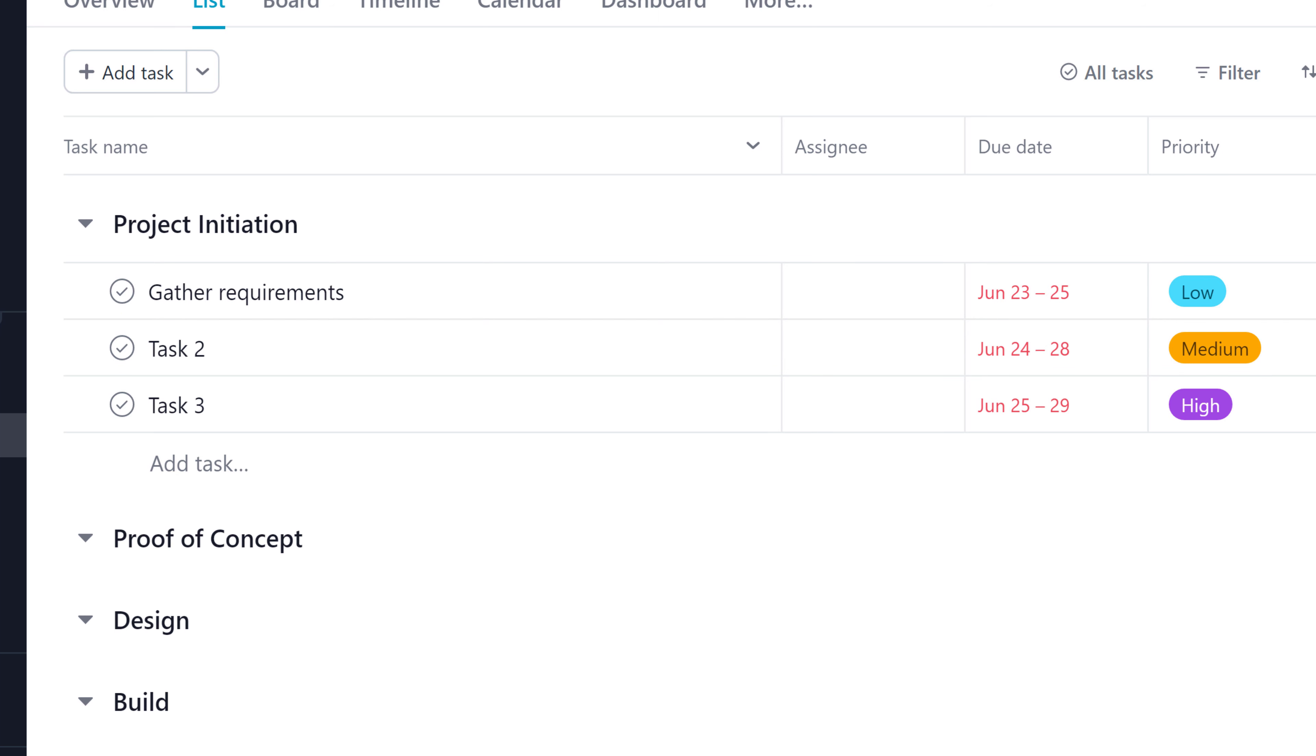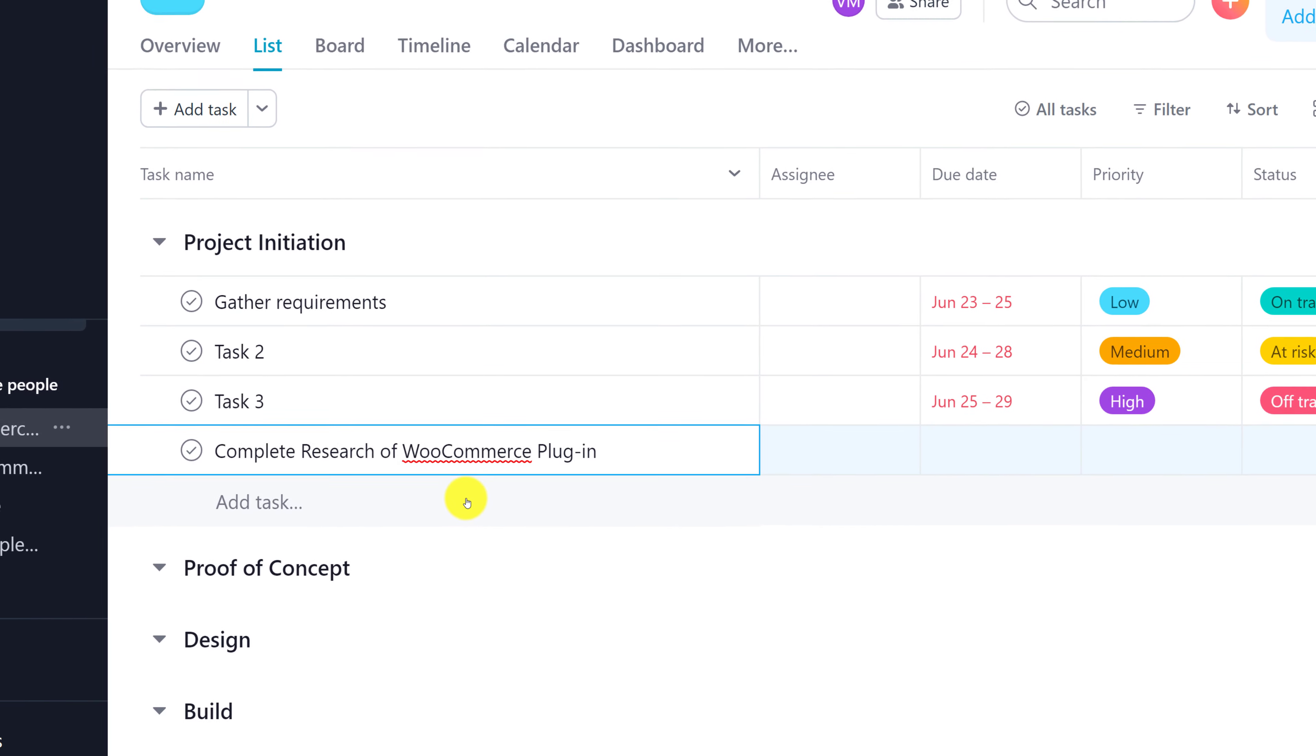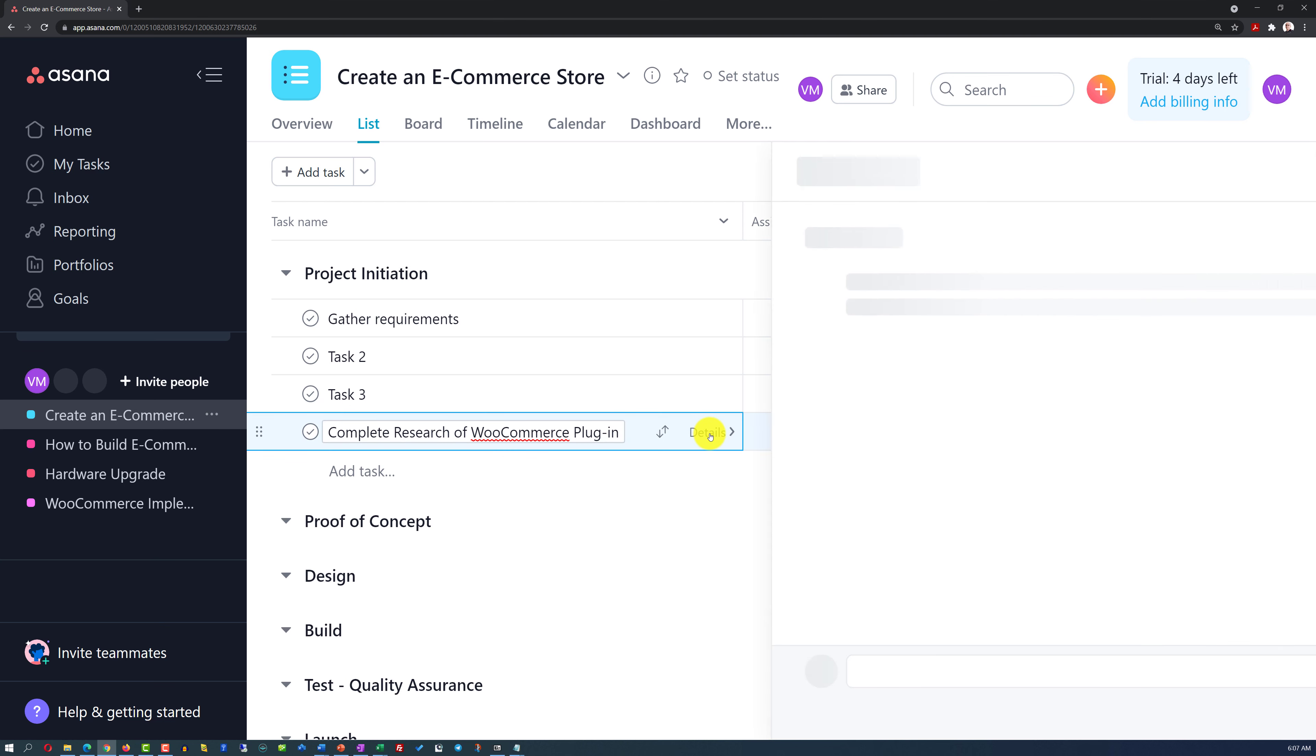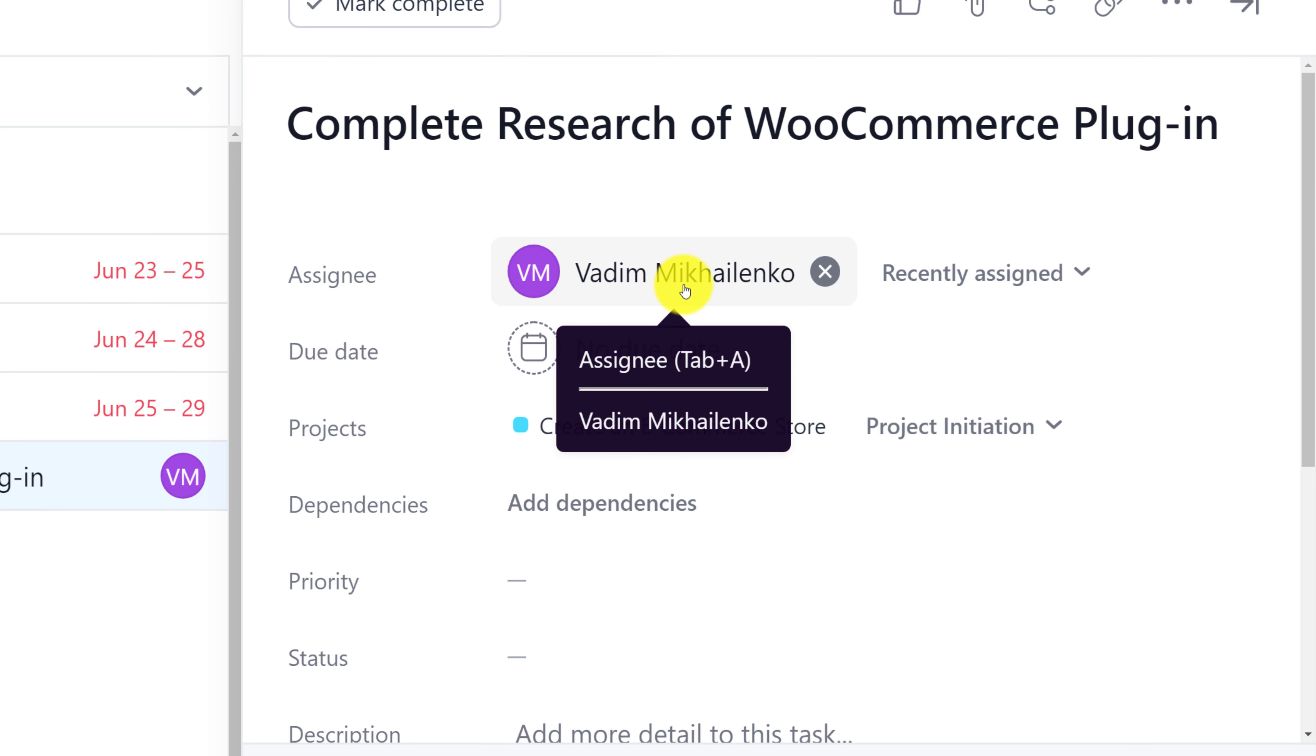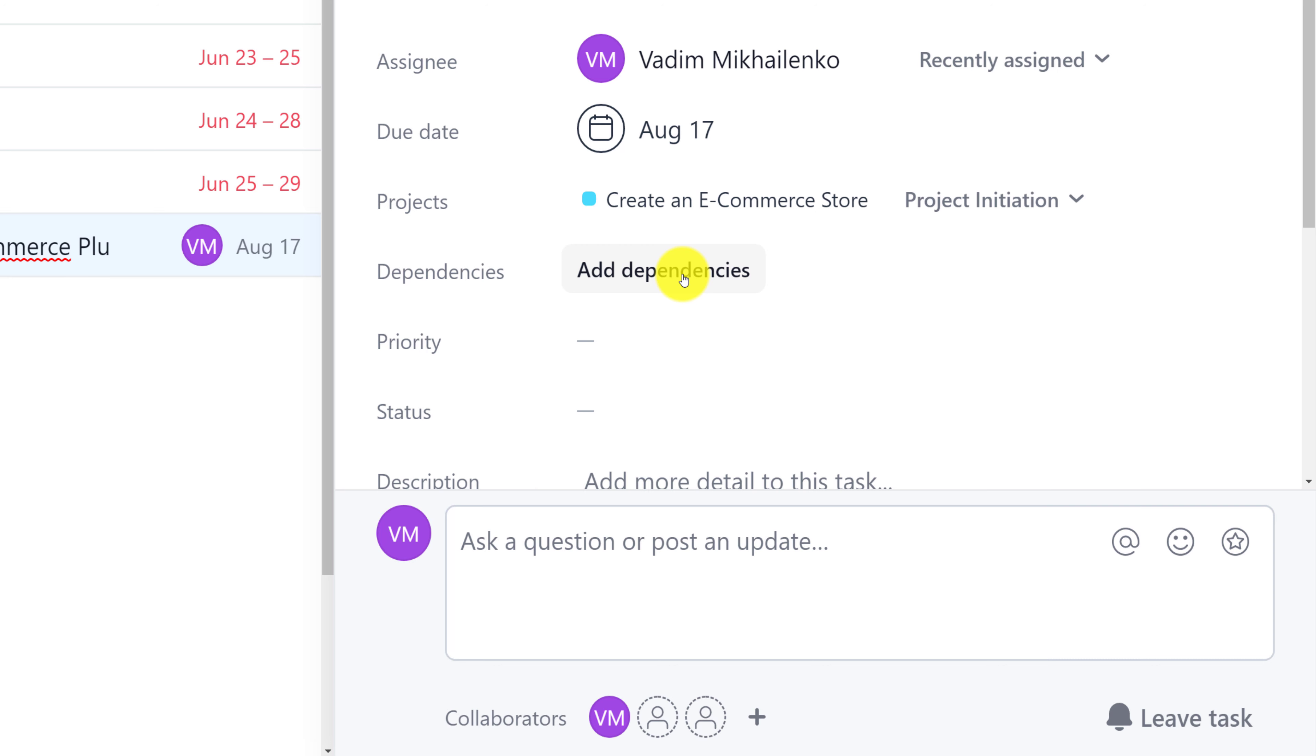When you create a new project planning in Asana, it comes with some pre-built milestones as well as pre-built tasks. We can add a new task by clicking the Add Task button. And I am going to write the name of the task here. My task is to complete research of WooCommerce plugin that is installed on WordPress to better understand what exactly needs to be done to configure a successful e-commerce store. Let me go into task details to better understand what exactly needs to be done. Here on this screen, I need to assign the task to somebody. In this configuration, I only have myself, but in a typical project, you have multiple team members, and you would need to define who is actually going to be doing this work. And that should be based on qualifications and experiences. You also need to define the due date. You select the calendar and define by which date this task would need to be completed. I am going to select August 17th.